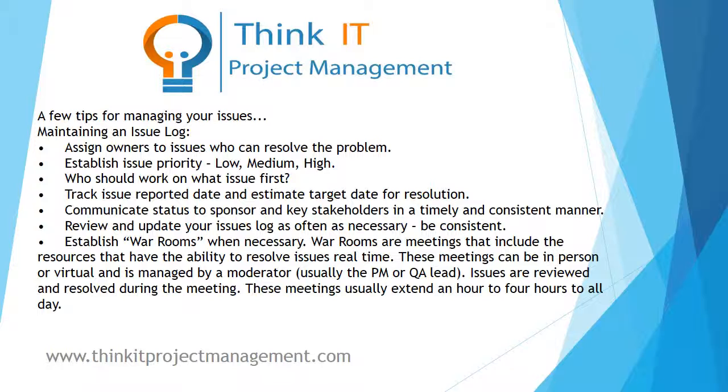When you have a complex project, when you have multiple issues that are to be assigned to various team members, not even outside of the project team that you're working on, it could be across the organization. You want to have what I call these war rooms, where it's a concentrated effort, where you take these issues with the folks that can fix the problem, and you work those problems real time. It could be in person, in a conference room as an example, where the issues are posted on the wall and the progress is being tracked. But more importantly, the folks that are there can address those issues.